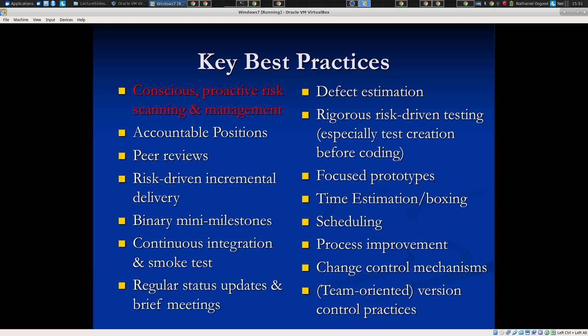Totally. And it happens. And if you're delivering very frequently, it's less likely you'll get that big surprise. But those different languages are key. And the project manager's need is to cross that language barrier. They need to know enough about how the end client speaks so that they can communicate to both sides of the equation, to the client and to their team. And that requires time. And that time is like gold, because it can mean the team not going down a rabbit hole and only finding later they're doing the wrong thing. So that's a lot of the job of the project manager.